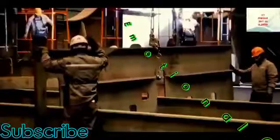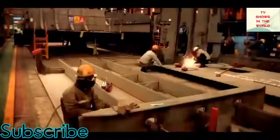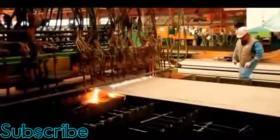It takes 2,200 tons of steel to erect each mega block. The reason for mega blocks is to reduce the time we use in a dock, because that's the biggest time constraint. The first block needs to be in place in the dock in just 5 weeks' time.